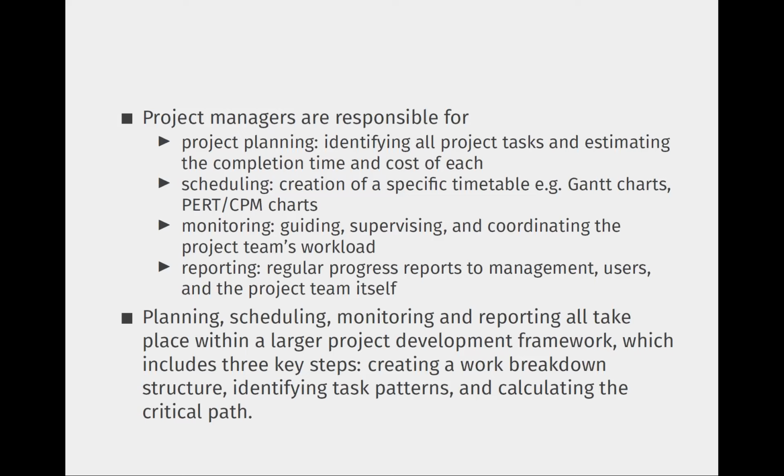Second one, scheduling. Now, sometimes when you schedule tasks, some depend on other tasks. So we need to clearly see this, right? So before you create a database, for example, you have to have a database design or ER diagram. So likewise, some events may depend on other tasks. Therefore, we talk about Gantt charts or PERT and CPM charts, as we call them, for the same reason. Then monitoring, right?